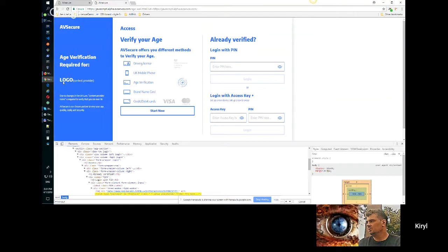You know, guys, what I think will be correct for us? The estimation is rough. Estimation is good, and we discussed it during the sprint ending on Friday: it is good for us to introduce an estimation system in Jira. What I suggest is we create a kind of backlog for Kirill with issues for estimation for UI, issues for estimation for functionality testing, and so on. And he will take some time to estimate them roughly in hours or in complexity.